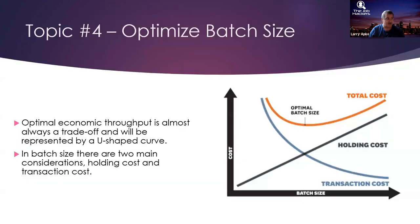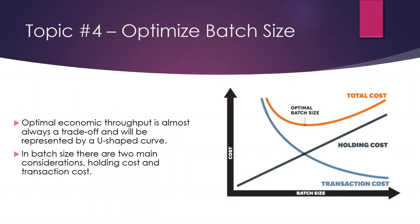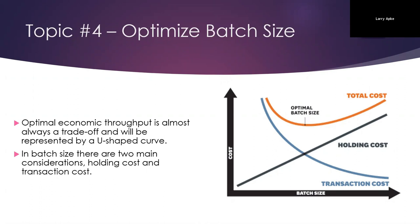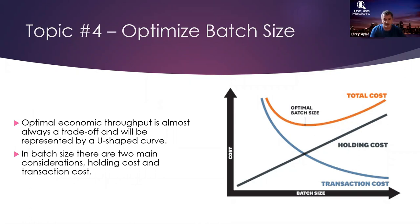We want smaller batch sizes, but usually not one-piece flow — going back to the middle path, how do we calculate what optimal batch size is? Mathematically, there are two things to consider: transaction cost and holding cost. Reinertsen illustrates this with an egg story: if I want to eat two eggs every morning, I can buy two eggs at a time — that's a low holding cost situation — or I can go to Costco and buy 730 eggs at once.